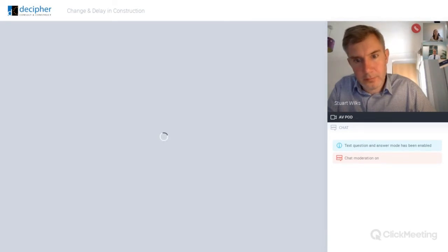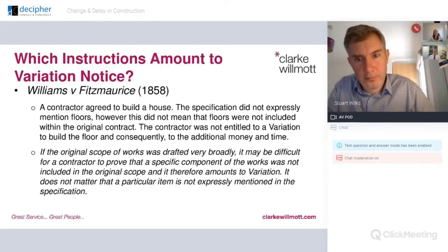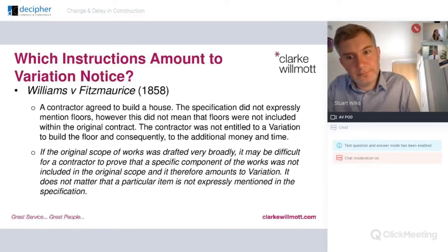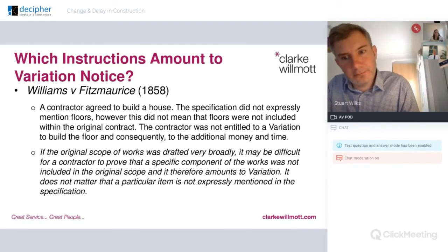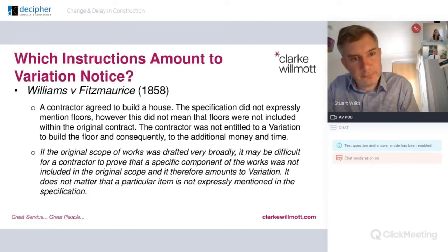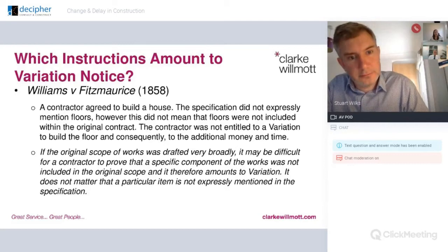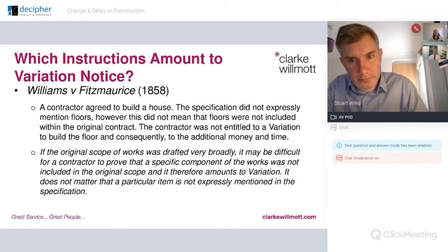Williams versus Fitz Morris is a very old case from 1858 where, putting it simply, a contractor agreed to build a house and the specification did not expressly mention floors. So the contractor wasn't entitled to a variation to build the floor and consequently wasn't entitled to additional time and money. This was a case where the scope of works was very broadly defined, and it illustrates the importance of understanding what the contract says you've got to do and making sure you preempt any issues by putting notices in and getting agreement to works beforehand.